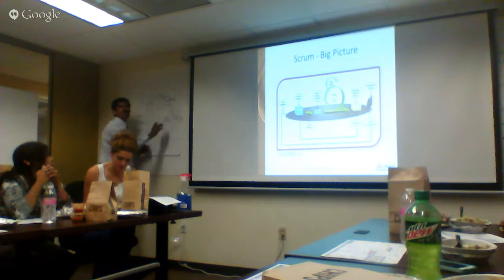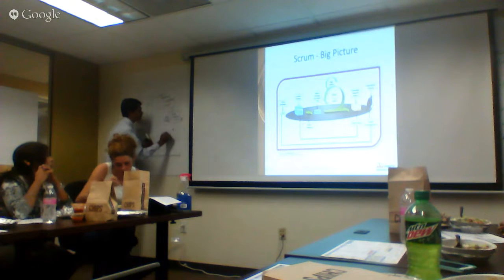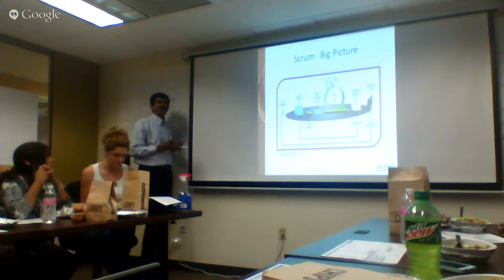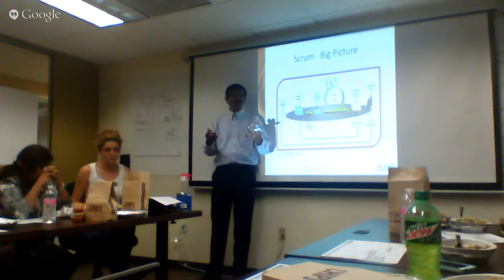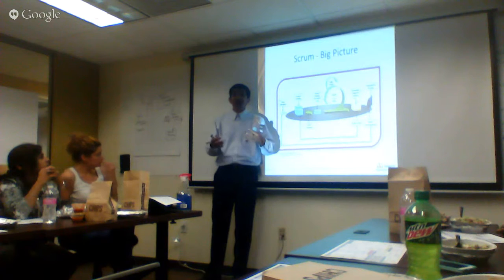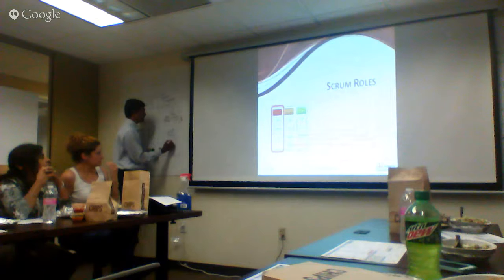Then, at the end of the sprint, the next ceremony we do, say it's a two-week sprint, we end the sprint at two weeks. We have a meeting called the sprint review meeting. This is a public end of the sprint. That means we invite the entire world to come and see what we have done for that sprint. And then we give a demo. The product team gives a demo, not the Scrum Master or user. The team who worked on that sprint gives the demo. That's the public end. Here, there is inspection and adaptation.